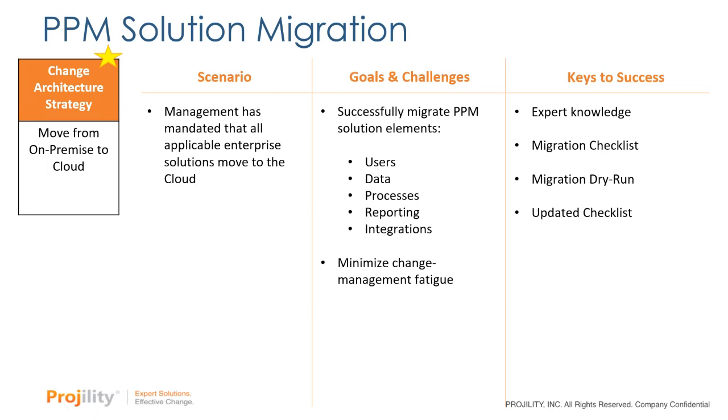This checklist they're going to use, it's going to include all of the currently known steps that will take your solution from on-prem and into the cloud, such as all the necessary software prerequisites, if there are any administrator user accounts that need to be set up ahead of time, or if there's any required target solution prep work so that it'll receive the data, things like that. If you can envision these, an activity having to happen, nothing is left to chance. It is all in this list so that it can be checked off one at a time.